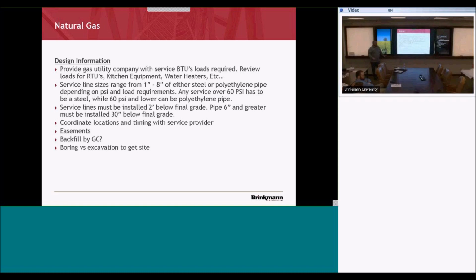Did they include all that pricing? We didn't have to cover it? That's no cost to us, because the owner is going to be using the gas. They're banking on the consumption of the gas being high enough that over time they're going to make their money back. If it was smaller units and they weren't using as much, then yeah, sometimes they'll charge you for it. So it's communication you want to have up front with them.